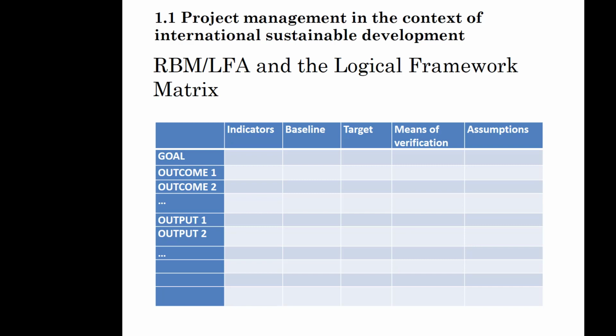A crude example would be: policymakers will read the research results. If they do not, the factor is considered to be out of the scope of the project to influence, meaning that the project has delivered the results, but the policymakers are not reading them, so they are not applying the policy changes that we have foreseen, and so results will not happen. So this is a very easy way of going around responsibility.